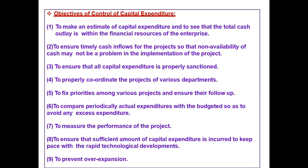The next objective is to ensure that all capital expenditure is properly sanctioned — this is a technical and legally bound objective. It should be sanctioned by top management. Without prior permission of major decision makers, no company is allowed to invest in any project just because they are going well or having profit. There needs to be both internal sanction of top management and external sanction of central government, state government, or statutory body.